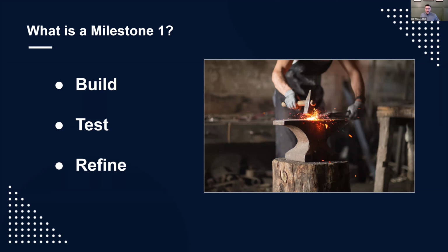Ku, is there anything you want to add? Yeah, I just wanted to reiterate the point that this is essential to the project. The milestone really helps us build and refine our parameters for the job, helps us iron out any kinks that we may find. So the M1 is kind of a representation of the entire job, so that when we run it from the beginning of the process flow all the way to the end of the process flow, we can test and actually deliver some portion of it so that you can test in your resting environment too, to make sure that it is what you're getting from us. And it gets all the stakeholders into one place where we can make an agreement that this is what we're ultimately going to deliver. Yep.